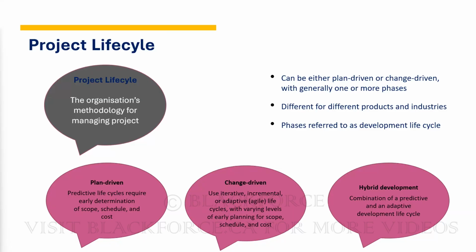Then I will now start iterating it, making it better, making it better, making it better until it is complete and fully functional. So that's iterative, right? I'll start with a skeleton and I'll keep adding to it and making it better. I have the old skeleton, home, about, service, contact us, but it's not working. But as I'm iterating it, I keep making it better till everything is fully functional. That's iterative.